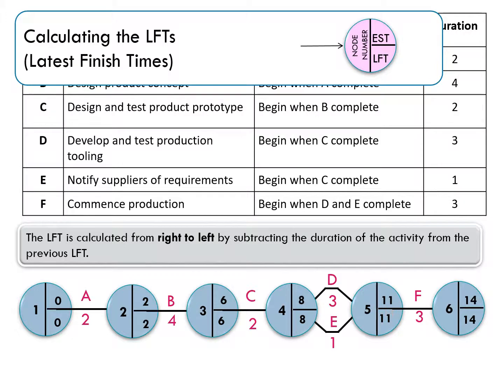So 11 goes here. Now here I face a slight challenge, because when I go from right to left now, 11 minus 1 (E) is 10. But 11 minus 3 is 8. So which of these two numbers goes in here, 10 or 8?